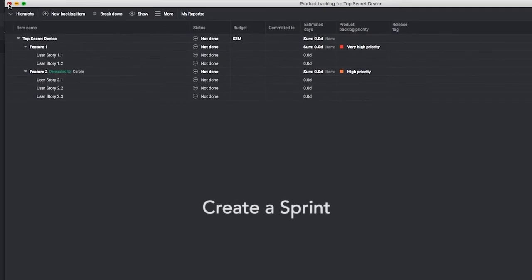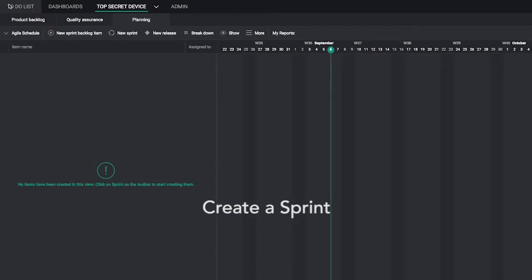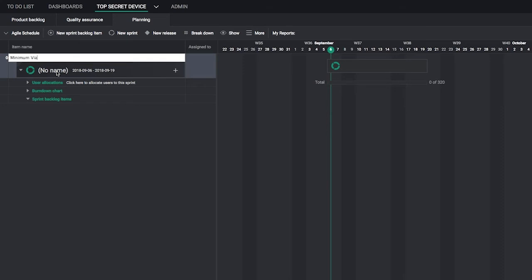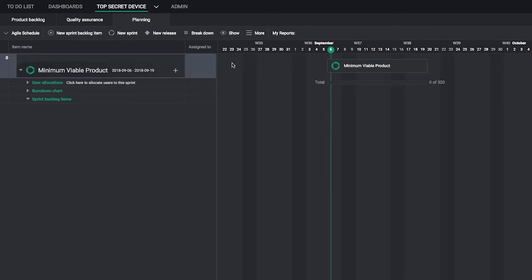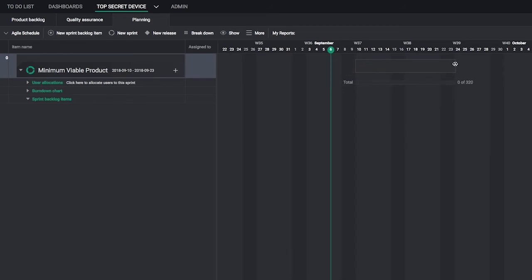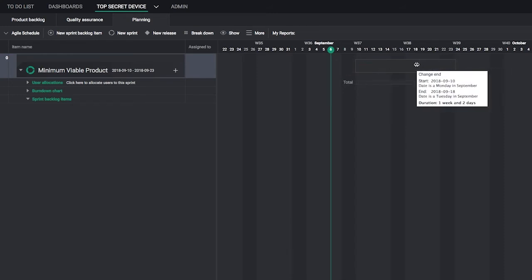Now, let's define our first sprint. Go to the Planning view, click New Sprint. Name your sprint. We'll name ours Minimum Viable Product. Define sprint start time, end time, and duration by clicking and dragging the sprint bar.